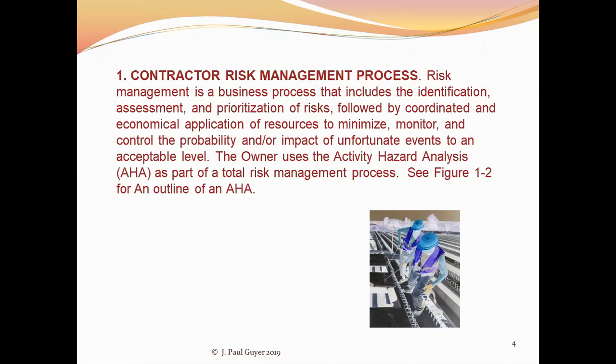So you identify the potential risks, you assess the likelihood that they will occur, and you then assess the seriousness of their occurring, and then you balance those two assessment values, you might say, together to arrive at, in your own mind, in a rational way, a priority for preventing that type of incident from happening.